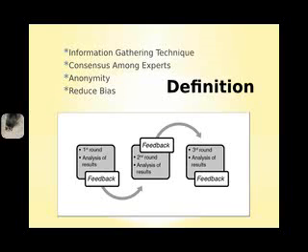This process also decreases the range of the answers, and the group will converge towards what is considered the correct answer. The information gathering rounds are concluded after a predefined stop criterion, such as the number of rounds or the stability of the results.